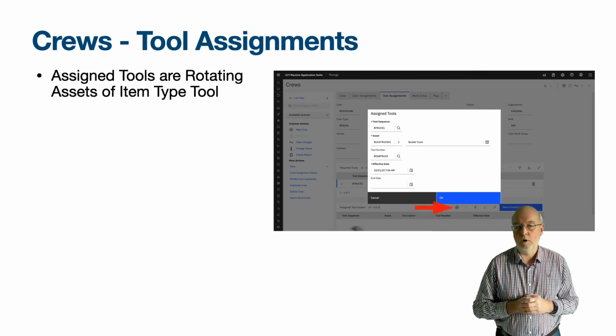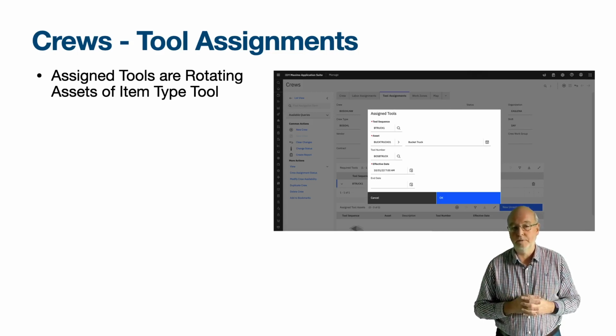If you use New Row, Maximo will check whether the tool asset is already assigned to another crew, and you would receive the error message BMXAT0770E Asset 1422 has conflicting crew assignments for the date specified. Change dates, resolve conflicts manually, or add using unrestricted row.